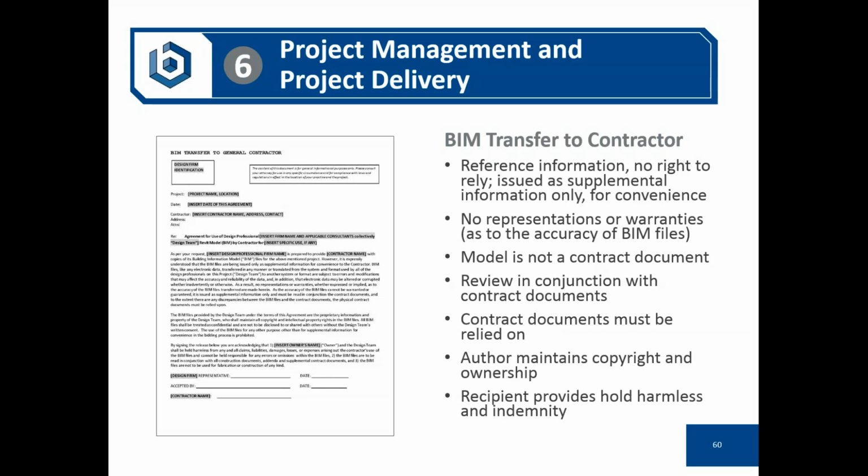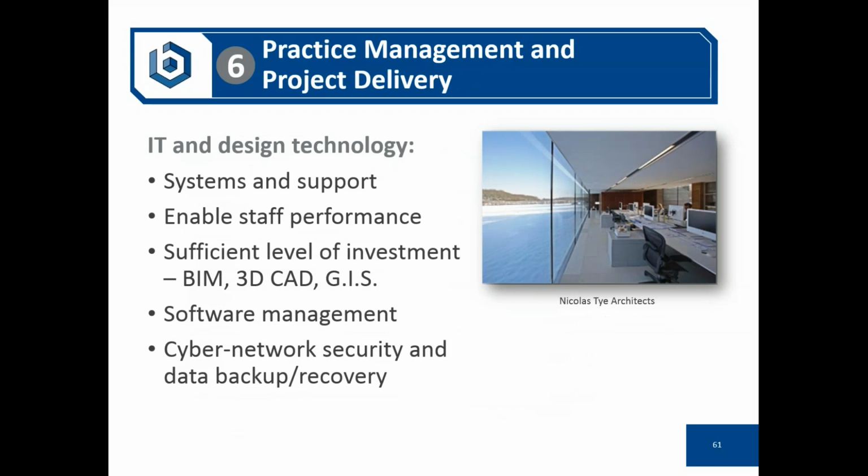You can't put any representations or warranties on it, and they have to use it in conjunction with the contract documents, which are to be relied upon. It also addresses your ownership of the copyright of your design product, and that the recipient of it is going to hold you harmless. So it's rather simple, similar in concept to what you had in CAD, but better defined so that these expectations are managed.